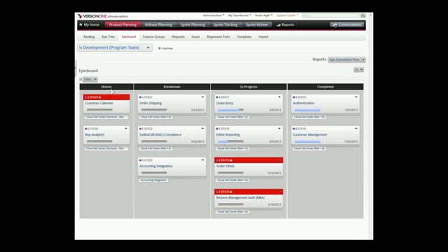So the project scope change report can allow you to take any 2 dates, oftentimes it'd be today, and compare it to some point in the past, and start date oftentimes would be, after we did release planning, what did we change after that? And it gives you some insight into what's causing your scope change, recognizing that in an Agile organization, you may be pulling things in and out, but that is going to mean your original plan is not necessarily going to be the one you end up with.